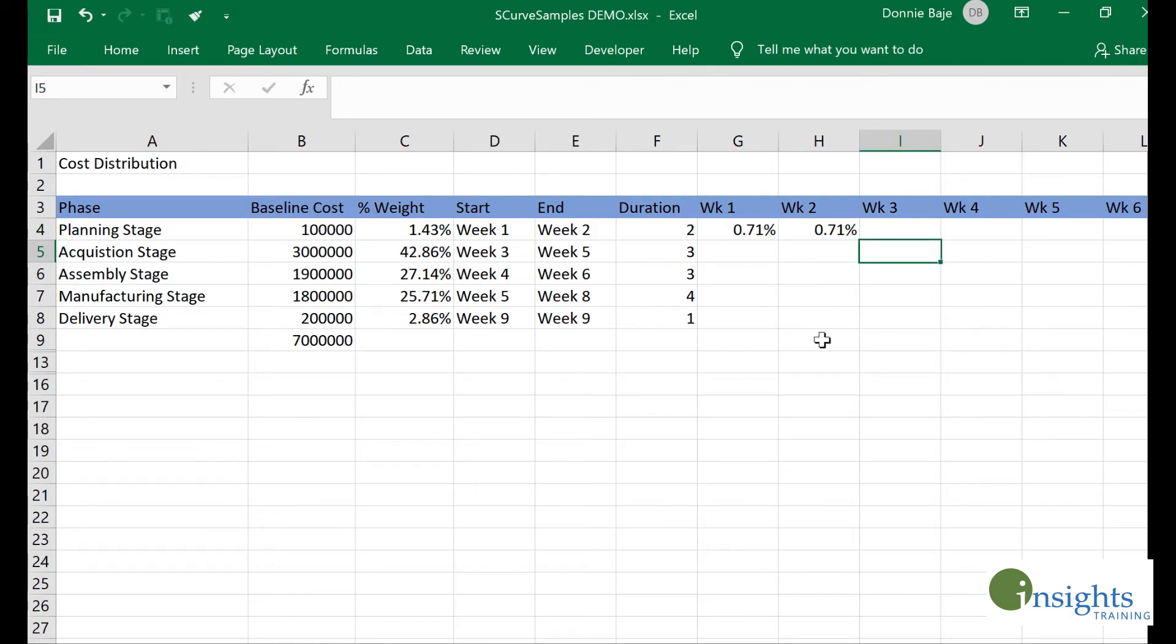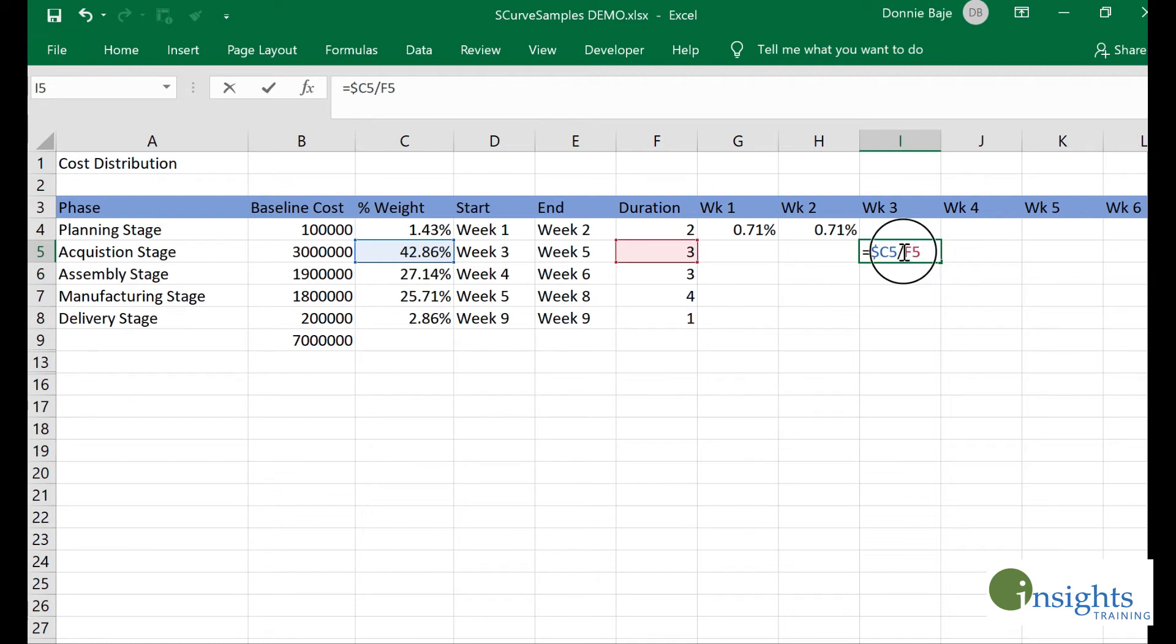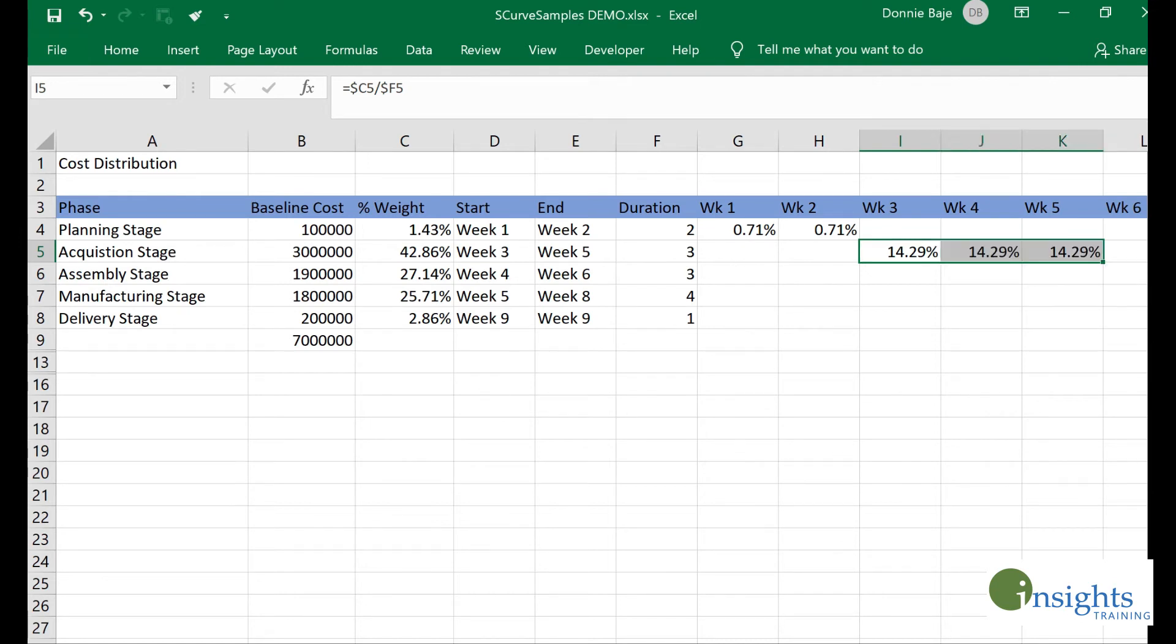For example, here we have week three to week five, so I will plot starting from week three. That would be the weight divided by the duration, which is three weeks. Again, I will lock the column letters so when I drag it later, it will not move to another column. I'll drag it until week five.